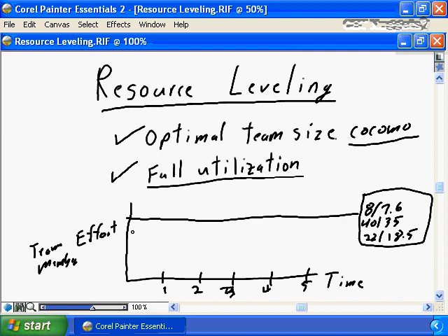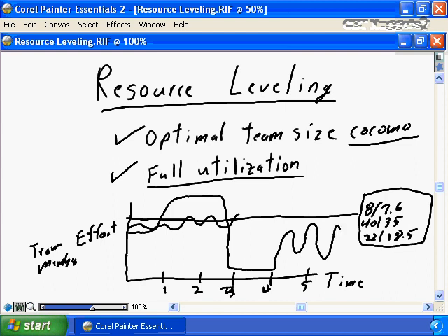And then you're going to look at each individual team member's utilization. If you have a team member that's flowing along at or about the effective level, that's good team utilization. But if you have a team member who's spiking, that starts off effectively used and then ramps up and becomes way overutilized, is working overtime and then drops off and is working only part-time for a period of the project, and then ramps back up and ramps down and is a very spiky, very uncontrolled, if I can use that term, utilization, then that is not proper utilization of your resource.